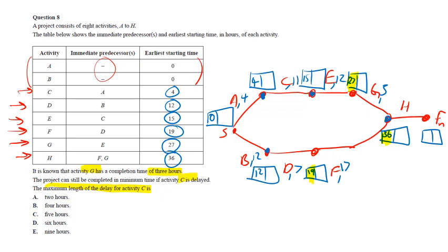If we look, if you've got 36 here, that's the highest number coming in, and it must be from the critical path, and C is not in the critical path. So it looks like the critical path is actually that path. And when I do my little green writing, you've got 27 plus 3, that gives me a 30 coming in here. And it was the 19 plus the 17 that gave us the 36. So we had these two numbers coming into this point, and we chose the biggest number because we're doing our forward pass. So we chose 36. But the other number is 30.